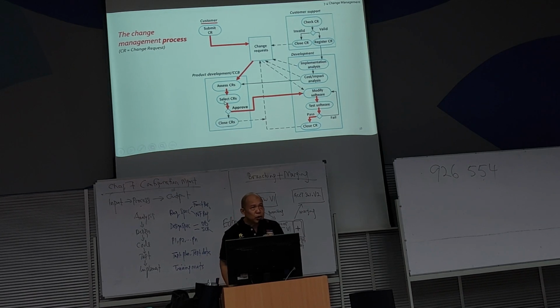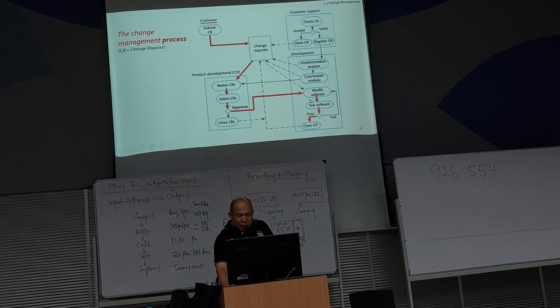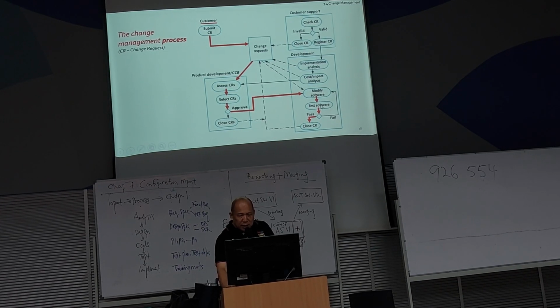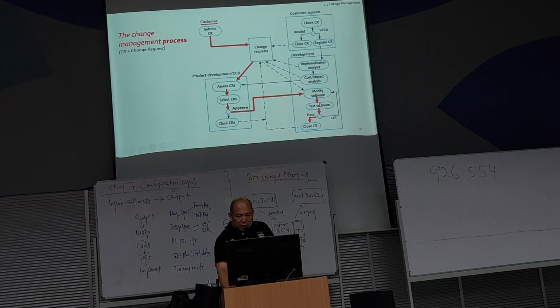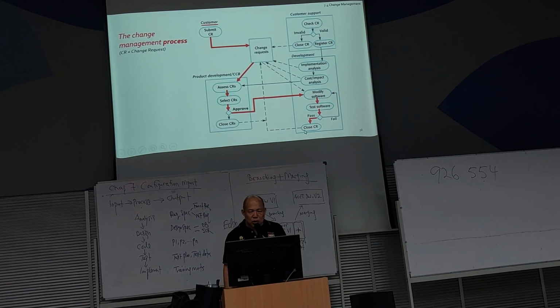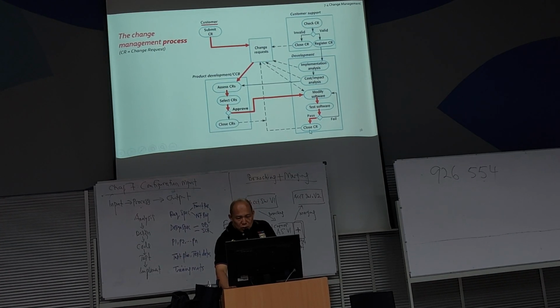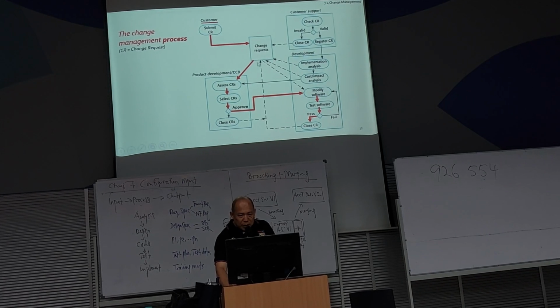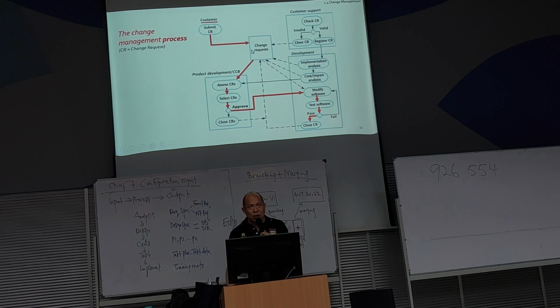Not all change requests will be approved, so select the change requests that you think you can approve. If approved, modify the software and test it. If the test is passed, then close the change request. Then come back to here, store all the change requests and update the status as approved.